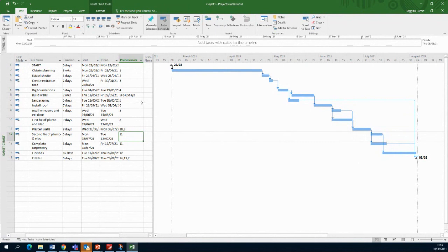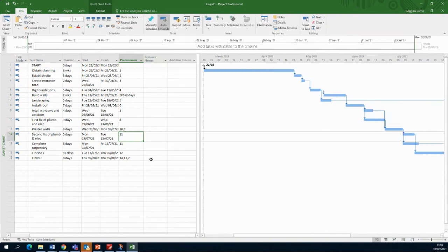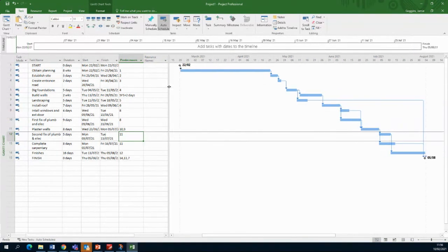I put the predecessors, in other words, what activities we need to complete before we start the next activity. So I've done that in there, so finish 2 days. And then later on in the course, what you'll see is we'll add in some resources allocated to these. So obviously we'll put in labourers, the machinery, the materials and so on associated with them, but we won't do that at the moment. And we've seen what the earliest finish time is.